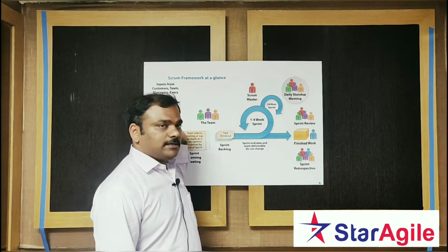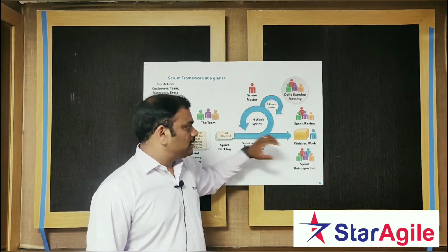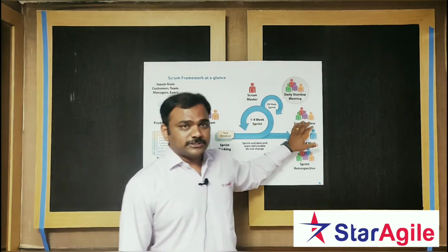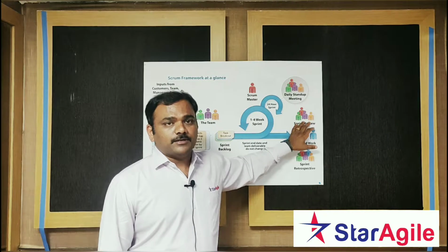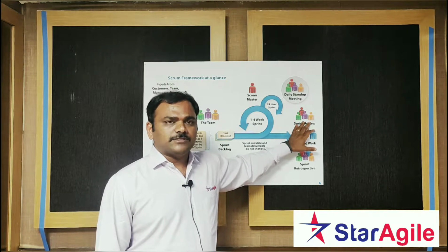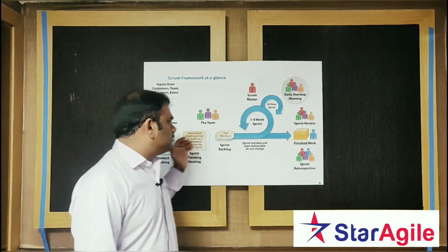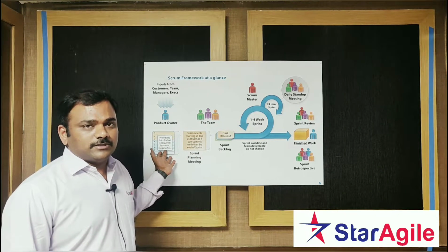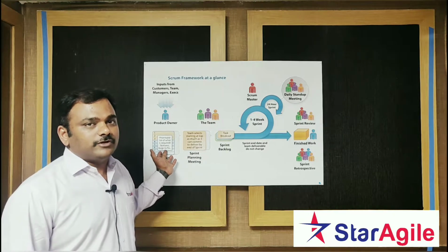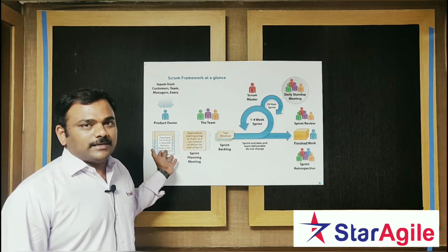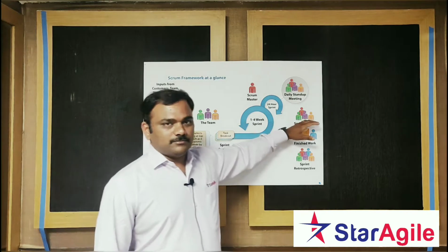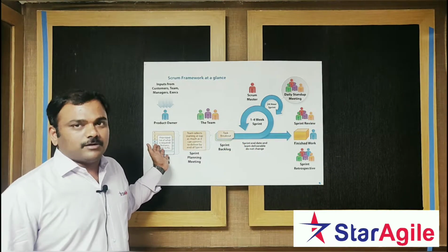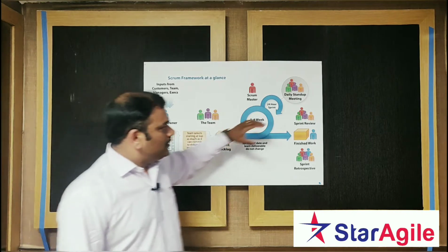When I say Scrum team, I mean the team, Scrum Master and product owner, to get together with other business stakeholders and showcase what they have accomplished in this sprint and get the feedback on the product increment. And that feedback from stakeholders could result in adding new items to the product backlog. If the product owner looks at that feedback from stakeholders and sees there is something we have to do differently, or a new feature can make it more valuable, using that feedback from the sprint review, he could end up adding new items to the product backlog or make some changes to the product backlog, right?